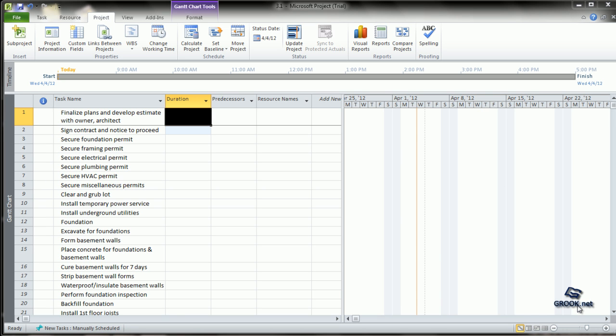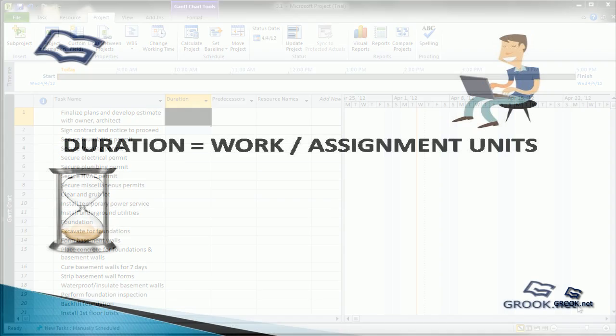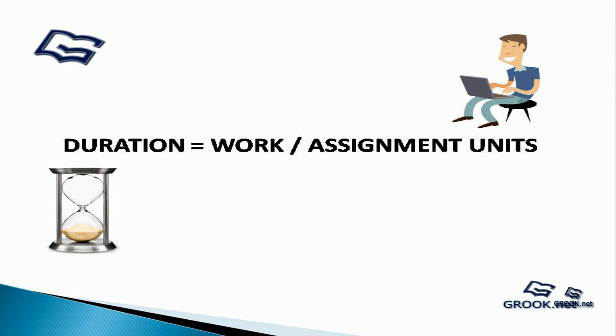Accurate estimation of duration is very critical to realistic and successful project planning. Past experience, precedence in other projects, and realistic consideration of resources available, dependencies, and other conditions can help in predicting practical durations. In MS Project, durations are given for each task.